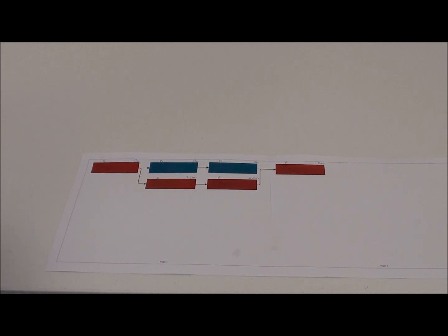So we have the bottom line here is our critical path for this project. Anything on that project extends, it will affect the end date of the project. If this wasn't done until the 6th—I'm sorry, the 6th is a Saturday—you may do that Monday. But if this wasn't done until Monday, you couldn't do that until Tuesday. So anything on this red line that is extended will extend the length of the project.